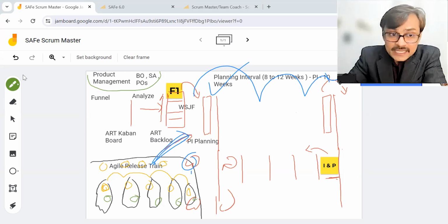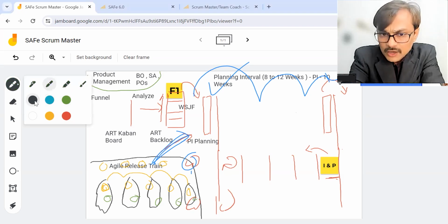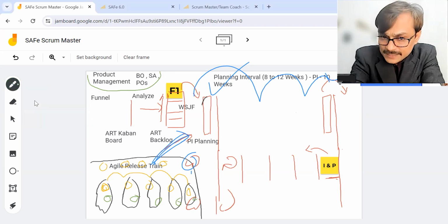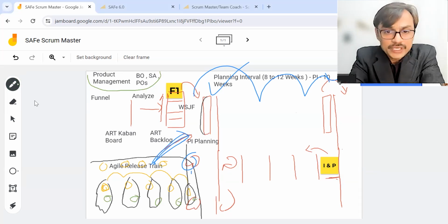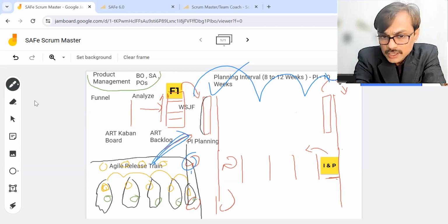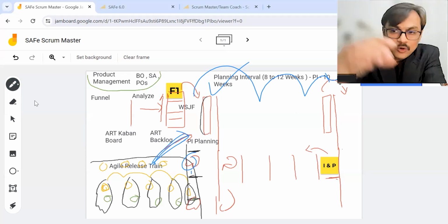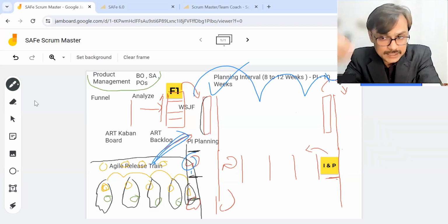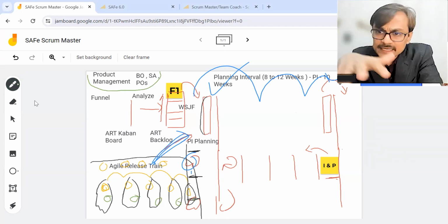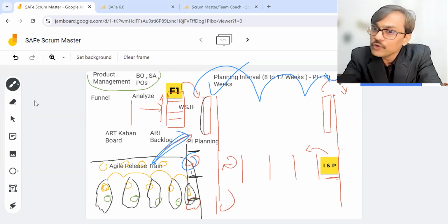Now, when my teams are expected to participate in a PI planning meeting, so we learned all of us will go to a PI planning meeting here. Yeah? And we are doing something called innovation and planning iteration, which will help us in doing preparation for the PI planning meeting. My first role as a Scrum Master is to know tentatively what my team is expected to do in the upcoming PI, which means what kind of features are expected to get done by my team will tentatively get allocated before we go for the PI planning meeting.